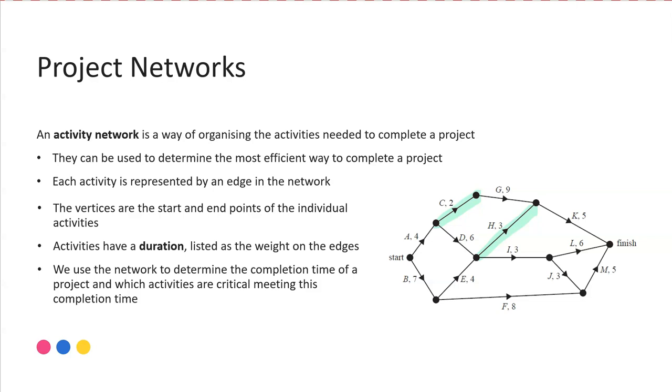We also can look at what we call precedence tables, and that's a different way of representing the information in a table form rather than a network form. We tend to use these networks to help us work out what is the minimum time required to complete the project, as well as other things such as what needs to happen in what order and what activities are critical to that completion time.